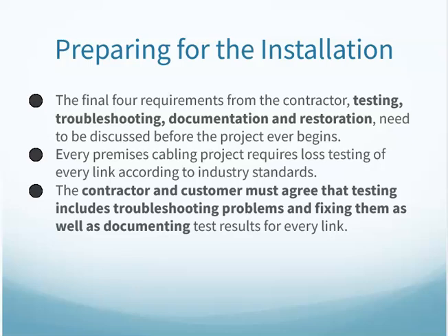The final 4 requirements for the contractor: testing, troubleshooting, documenting, and any kind of restoring of connections that need to be done. This should be talked about ahead of time so the contractor knows what do I need to do, what don't I need to do. And the contractor and customer must agree on all this and lay it out. Do we need to troubleshoot everything? Do we need to certify it all for you? Do we need to document it all for you? What is it that you need from us?